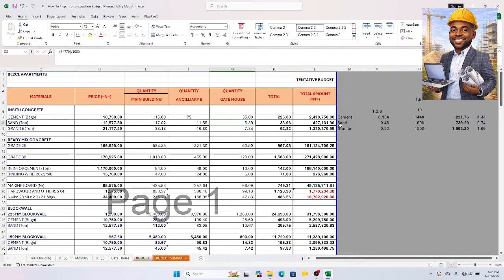We've treated cement. Now I want to treat the sand. The same method. Sand is 1:3:6. The 3 there stands for the sand. So it is 3/10 times the volume of dry weight or the bulking factor. 3/10 times 1.54. You see it here. Times 1.54.